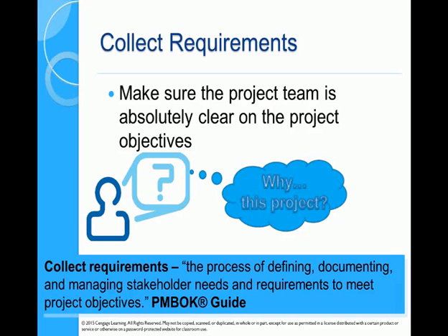Requirements means you go back to your stakeholders and basically say, why do we want this? What sorts of features are you looking for from this particular asset? The requirements matrix asks the stakeholders to say what business needs, what are they trying to achieve out of it. The example we used in the lecture was a patio. One of the requirements was shelter from the sun. The feature that was built was a shade cloth. That sort of idea.